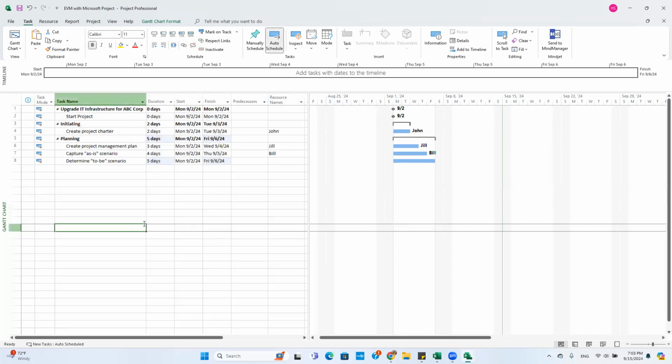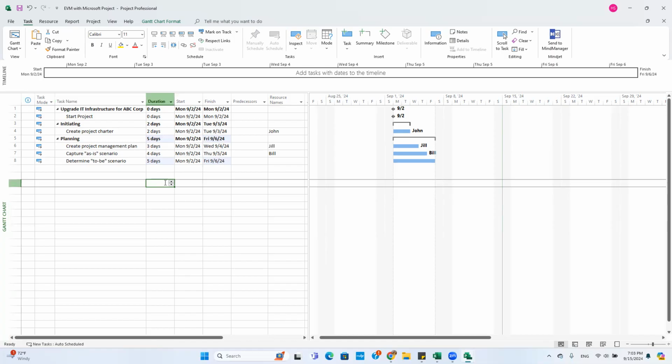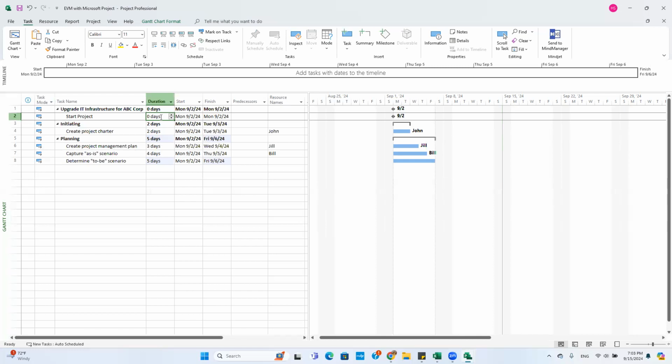Once this is done, the system will automatically make sure that your tasks are properly linked when you move things around, when you make changes, so you don't mess up any dependencies. Now once you have done that, we need to link the tasks. I'm going to link just finish to start for this demonstration. What you do is you click on the duration part here for the first task, and do not do anything to the summary task.